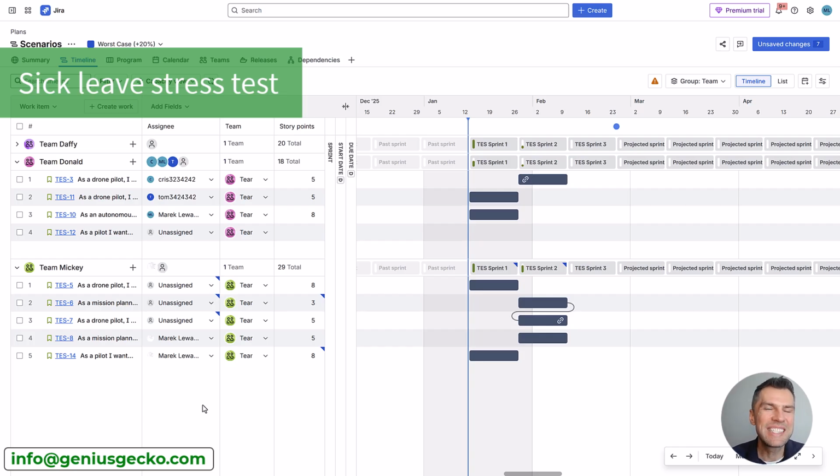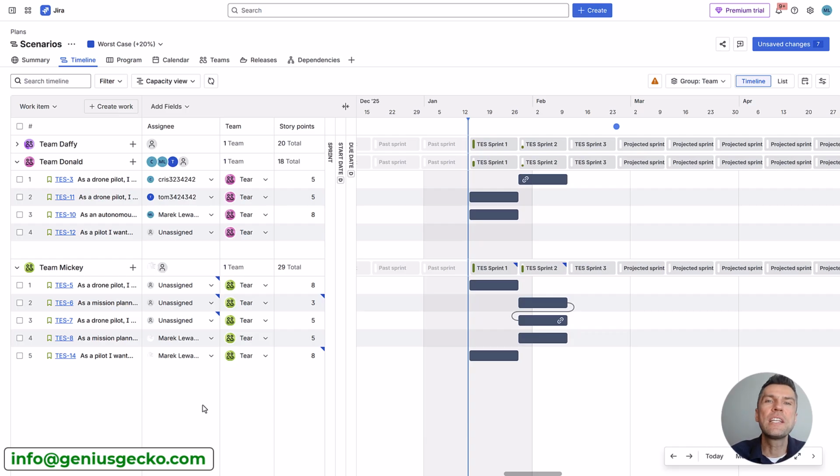This proves that the issue is not that Anna is sick, but that there is no redundancy for Anna's skill set. This is how you can justify cross-training or hiring. But again, at the end of the video, I will show you a more advanced method when you actually see the list of skills, not just have to conclude based on the bucket of your unassigned tasks.